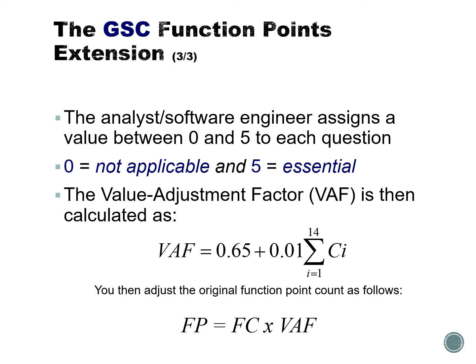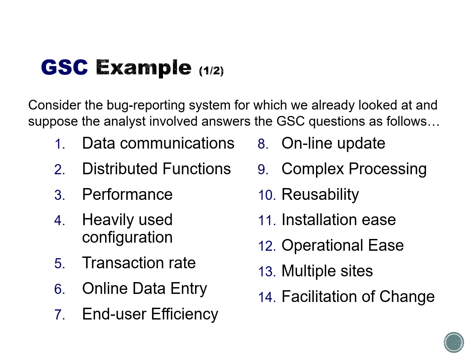We define different factors for how important each thing is for us, then sum up the factors and the points given on that basis. So the end score on these, based on the previous example, which I'm doing as a cooking show approach here, saying that we prepared this earlier, would be something like this. With these factors from 0 to 5, and with the questions of how important these things are and how many of them there will be, we get an internal score of 25.